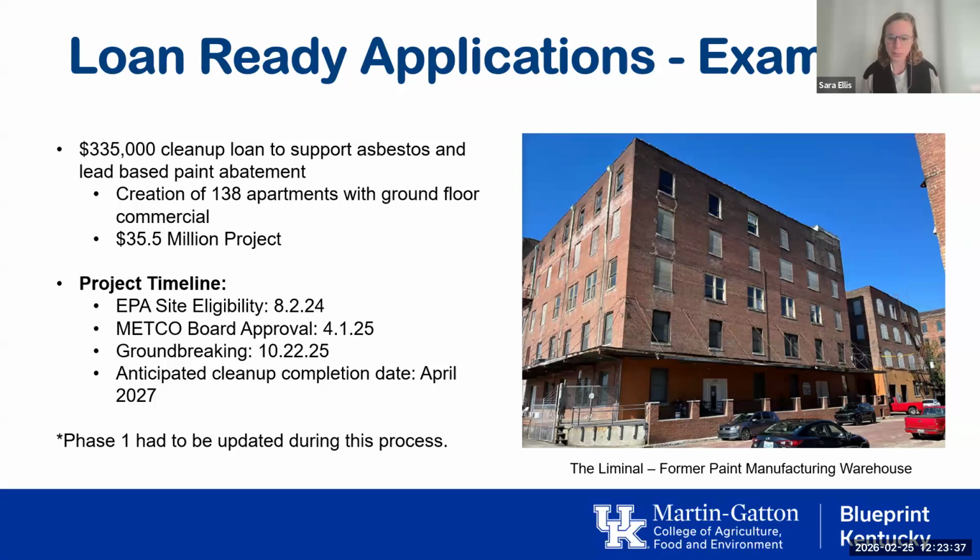And this is just one example. Every project is going to be unique and look a little different. We started out, and I think Kiersten mentioned the EPA site eligibility. That's the first part of any project that's going to take money from us. We need to make sure that they're eligible with EPA. So I just put dates on there really just to show you that this one from EPA site eligibility until groundbreaking was about a year.